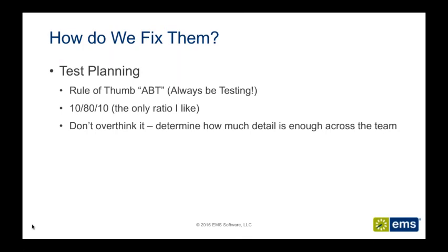And then, really, don't overthink it. This is a stretch goal for us currently in our organization. At a previous company I was with, we were sitting at around 50%, 40%, and 10%. We got that 50% of test management and test planning, actually writing the tests, down to about 20%. That was a significant decrease in what was really considered overhead of writing the tests. We still got what we needed, but we were able to increase actual testing during that time.